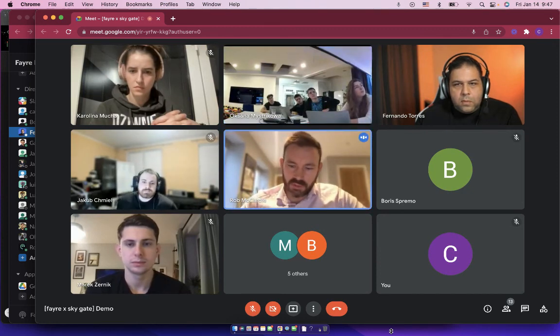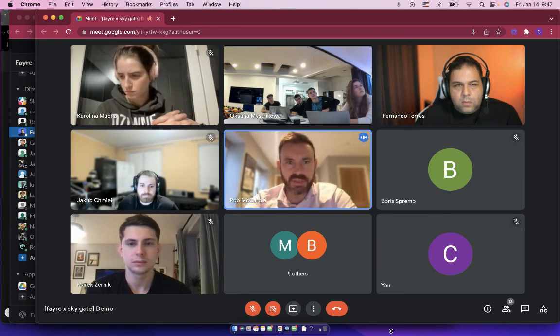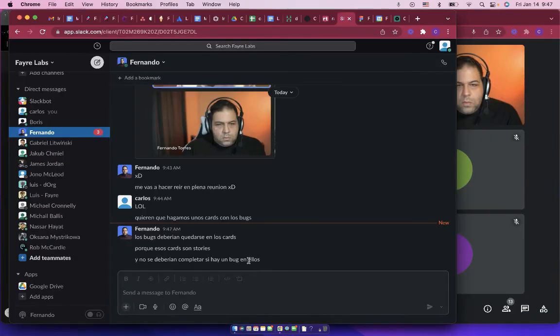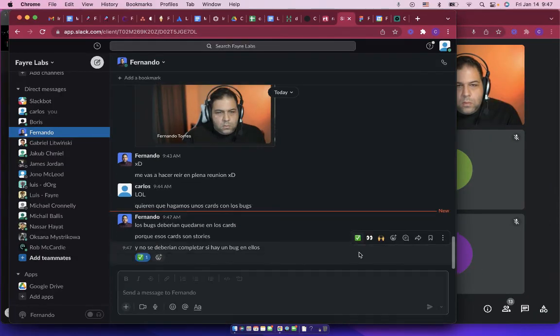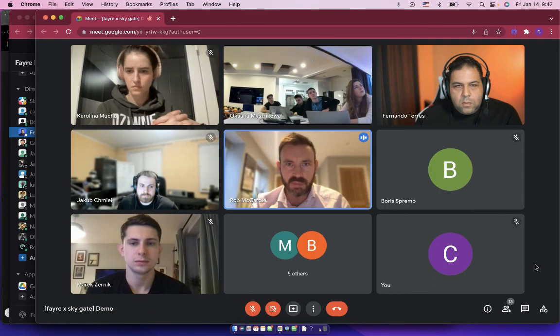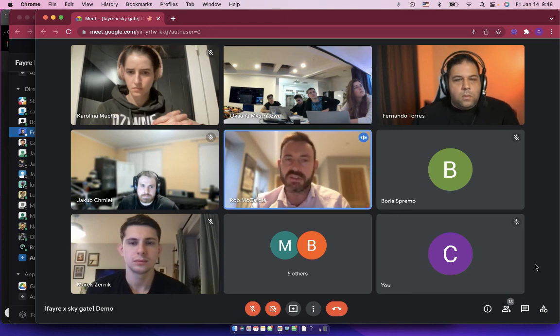I think we should draw the meeting to a close and pick up on Monday. Although I have to say that we're not moving fast enough, and we're not happy at this point in time. I'm going to try and keep it as constructive as we can, but we need to impress upon you the urgency of improving the speed at which we ship, the quality and the volume of software that we get out. There are 27 working days till our intended launch date, and we are behind. If there are any hours that you guys can find from anywhere, or any way you can accelerate it, I'm not sensing an urgency from SkyGate, and we are feeling significant pressure at our end.